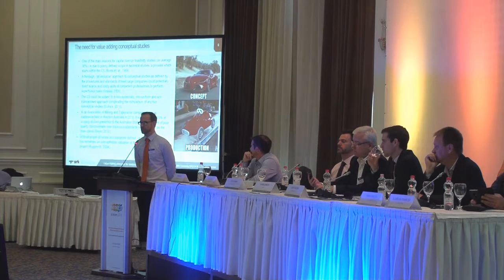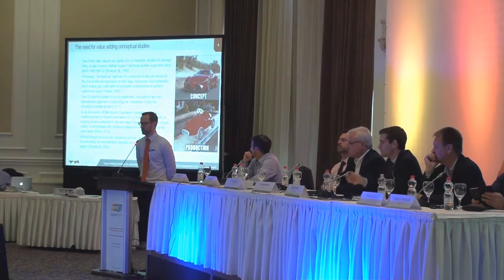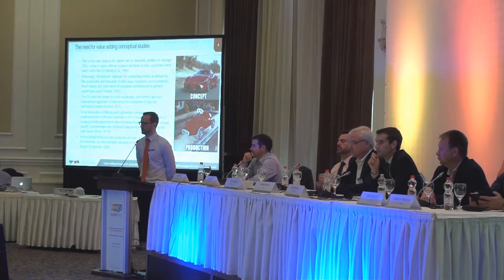At a fairly recent Association of Mining and Exploration Companies annual conference held in Australia, it was stated that 83% of scoping studies presented to the ASX were of poor quality. Controversies over disclosure standards were identified as one of the main causes. So a conceptual study could be subject to a non-systematic, non-uniform and non-standardized approach. And this also makes it really difficult if you want to compare conceptual studies.